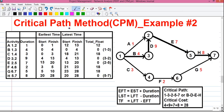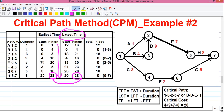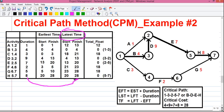Next, we will calculate the latest time. Our next step is to find the maximum value among all values in the EFT column. Here, our maximum value is 28, which sits at the bottom. But remember, in a different question the value may not be at the bottom — it may be anywhere in the middle. So just look for the maximum value in the earliest finish time column and copy that value at the bottom of the latest finish time column. That is our first step for latest time. From this value, we subtract the duration: 28 minus 8 equals 20.